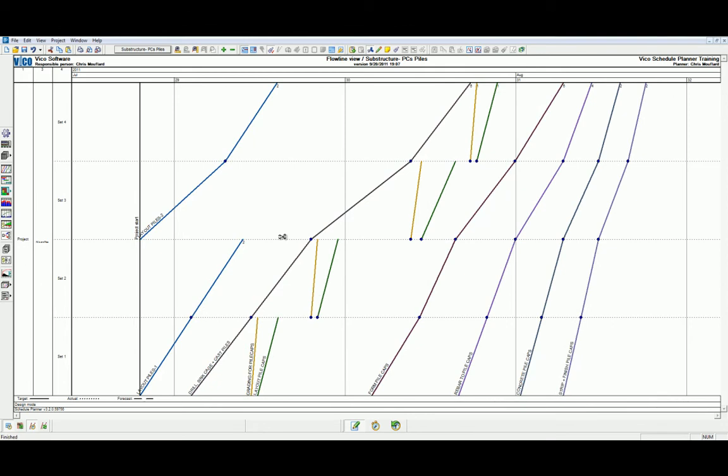As you can see, we have now created two new task parts for the layout piles task. These tasks will operate independently. And this gives us the option of introducing additional logic, increasing the resources in the optimal crew size, or making one task continuous and the other ASAP.